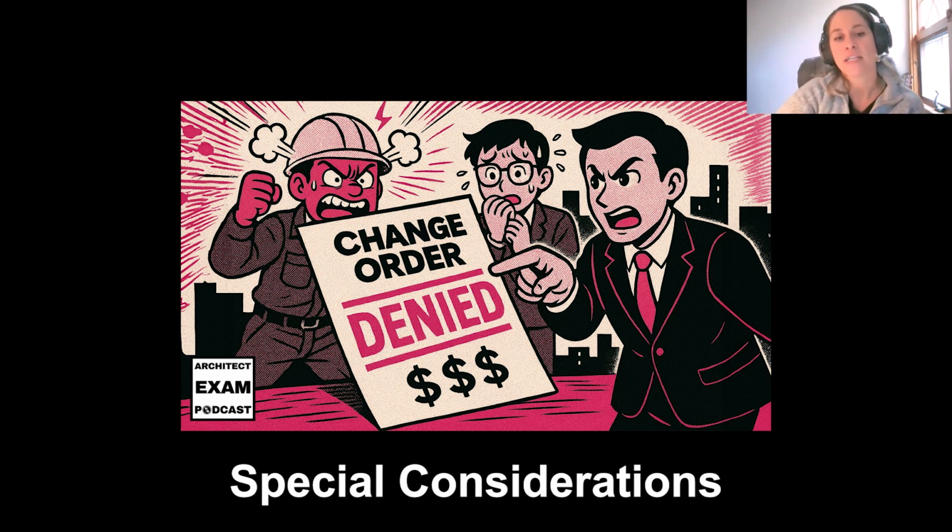There are exceptions to this, including the contractor's obligation to notify the architect of any observed issues, and variations of the Spearin Doctrine do exist across different jurisdictions. There are little variations, but essentially what this doctrine is calling out is the architect's issues with their drawings and their work. This is something that really scares us architects, but it's a good legal principle to know and understand in your profession. The project delivery method that a project has can also impact the claim.